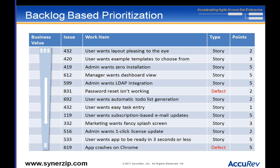Next, we take all these user stories for this project and put them into something called a backlog. The backlog allows us to rank work by business value. Often you might say all the work is equally important or has no value unless you do it all, but generally that's not true — different stories have different business value. This is one of the main points: think in terms of value to the business and the economics of development, not just the cost side and efficiency of getting that work done.